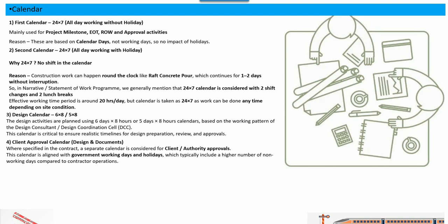As we are aware, the client has a high holiday percentage as compared to the contractor. So some contractors have given their calendar stating that these are our holidays and these are our working days. Like in their organization, the first and second Saturday is not working, or all Saturdays are not working. So this will depend upon the contract condition, if it's mentioned that you have to consider the client approval calendar.